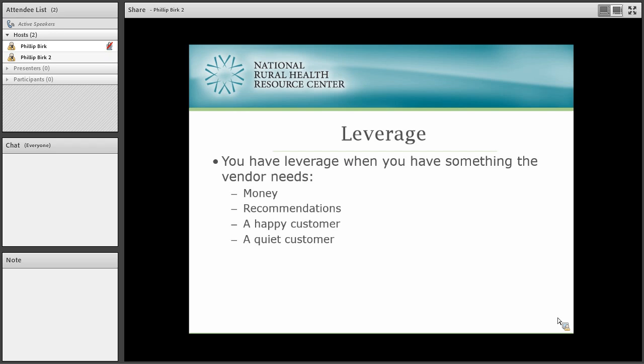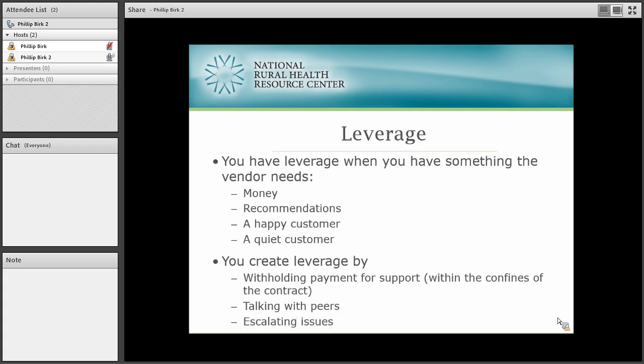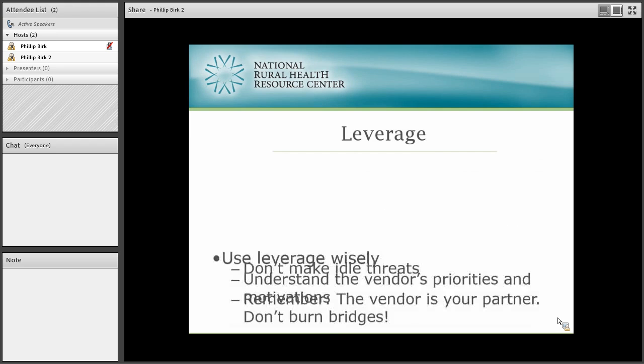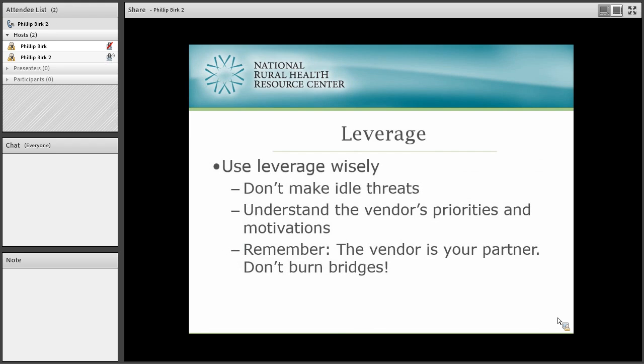Be mindful of stepping on toes. Like I said, don't go around the escalation path. Use the escalation path. When you escalate higher, you're going to need to get more specific and have more evidence of the problem. Make sure that you're prepared to have a well-documented description of the problem, a well-documented description of what you've done to resolve it, who you've talked to, and have evidence of what the risks are. What the risks are, how many people are affected, how many other customers are affected as well, can be helpful.